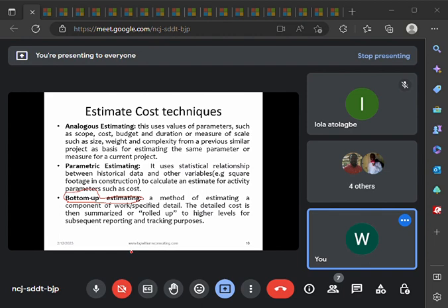That is the work package. Then we now say that there are a series of tasks or activities that need to be done to achieve clearing of the land. So now, if we are able to decompose and get those series of tasks, by the time you put, let's say, renting of excavators, how much, and other things that you need to put in place as regards clearing of the land, each of those estimates for each of those activities sums up to form the cost for clearing the land, which is different from the summation of the cost for mapping the land, which is different from the summation of the cost for digging the land, which is different from the summation of the cost for pouring the concrete and everything on the foundation to set block. So you see that all these are different costs, but the estimation starts from the base.